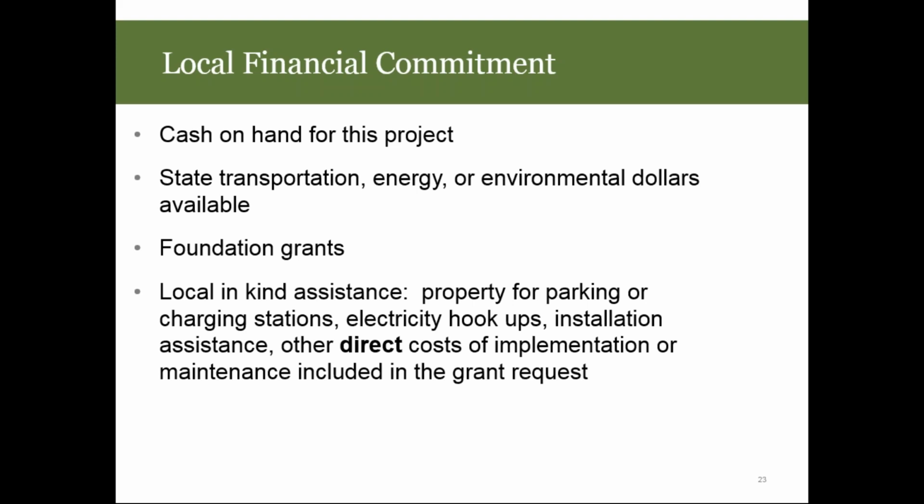This is Blake from Park City. I think our biggest was just from the power company, but we did on our second grant. We actually did also receive a commitment from the actual bus manufacturer to reduce the prices, by basically a $25,000 commitment per bus to help with things as well.